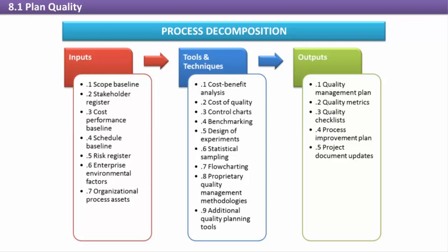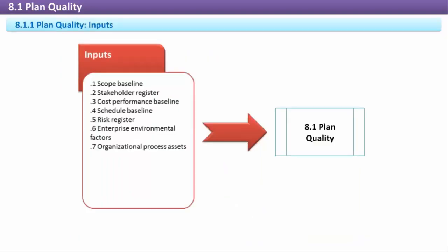The project quality baseline is the agreed-upon level of quality requirements the project must meet. It's the quality objectives of the project and the subsequent plan for achieving those objectives. In other words, the quality baseline is the current project quality management plan, which itself reflects all approved changes affecting quality.